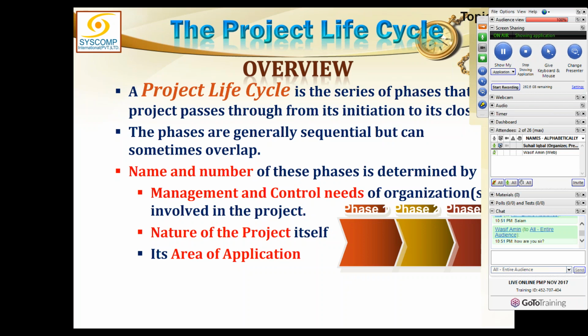You must keep in mind the technical work, what you are doing, what you are constructing, what your project is, and divide that work into surgically separate portions or parts and name them according to the technical work involved in it. So I would rather like the phases given by Sayyid Raza. They're even better because they are more specific. But the only thing I notice is that they have to be a bit more clearly marked, so that I can say this happens after this has finished. I want to see them in a sequence, one after the other.